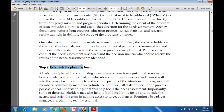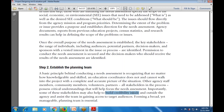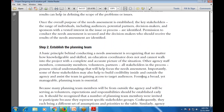Step number two is to establish the planning team. The basic principle behind conducting a need assessment is recognizing that no matter how knowledgeable and skilled, the education project team coordinator cannot walk into the project with a complete and accurate picture of the situation. Community members, volunteers, partners, and stakeholders all provide critical understanding that helps focus the need assessment.